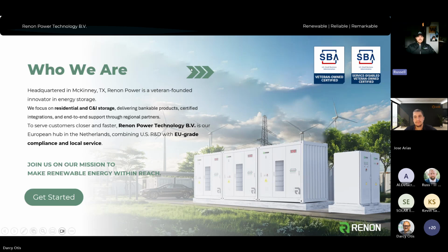At the 30-day mark, we ensure the installation went smoothly. At the 60-day mark, we validate that operations are as expected and they're able to utilize it in the expected use case. And then at the 90-day mark, we do an actual value assessment to make sure that these batteries are creating value, reducing the cost of their bills, and we can provide evidence that the value creation is there. So we're really looking to provide a complete white glove service for all of our customers, leveraging our larger scale C&I solutions. If you'd like to find out more, we host our own webinars on a probably 2-a-month basis, sometimes 3 when we do it with partners as we are here.